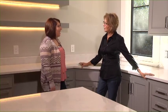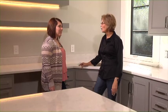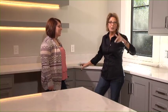Did you also notice that we finally got the big linen closet into the master bathroom? I did. What a relief. It looks great in there. For those of you who might have missed the last episode here on For Your Home, Alicia's company did this incredible walnut linen closet for the master bathroom, and it was to go into the water closet. When it arrived, it was one gigantic piece because it is a piece of furniture, and we couldn't get it into the room. So we had to tear out the wall, move an electrical plug, reframe, get it in. But once we got in there, it just slid right back in, absolutely perfect. We were all really excited. It's an absolutely beautiful piece. So nobody's ever going to know except you guys, right?